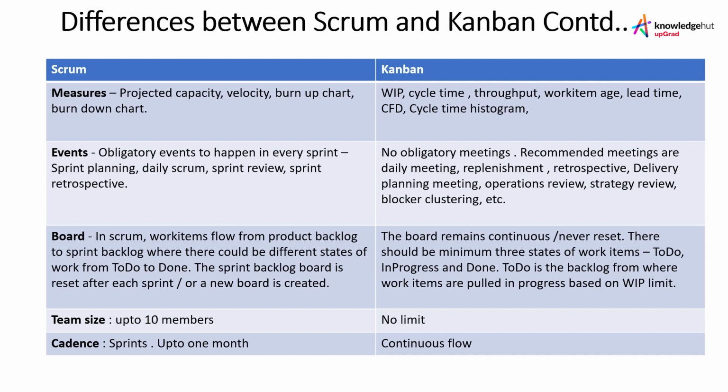When we talk about the Kanban method, this method does not prescribe any mandatory meetings. There is no such mandate about any events or any meetings in Kanban, as again, it's not a project management framework. It is a method for your workflow management, your workflow optimization, more precisely. But still, the recommendation is that if you're using the Kanban method, you should not think like you won't have any meetings, because outside that workflow, you would definitely need certain meetings to manage your project well.